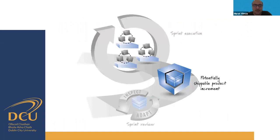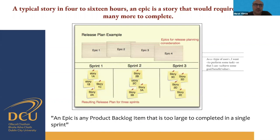We inspect and adapt in the sprint review. After sprint execution, we need a potentially shippable product increment — not the full product, but an increment the customer can inspect. Based on this executable product piece, we inspect and adapt. A typical story takes four to sixteen hours; an epic story requires more time. There will be some epics in the release planning, but normally you can see sprint one, sprint two, and sprint three with several different stories embedded in each.